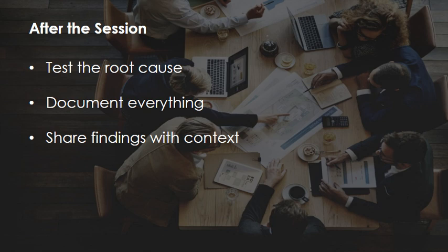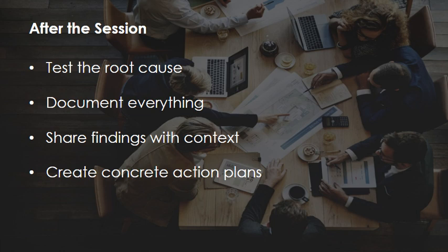Share findings with context. Oftentimes it will be useful to generate a summary report. However the process is quantified, use it to send the information to the broader team. Add narrative about what was discovered and what actions are being taken. Create concrete action plans. Define specific solutions, not vague commitments like improve our process. Assign clear ownership. Set defined deadlines. And schedule follow-up reviews in 30 to 60 days.